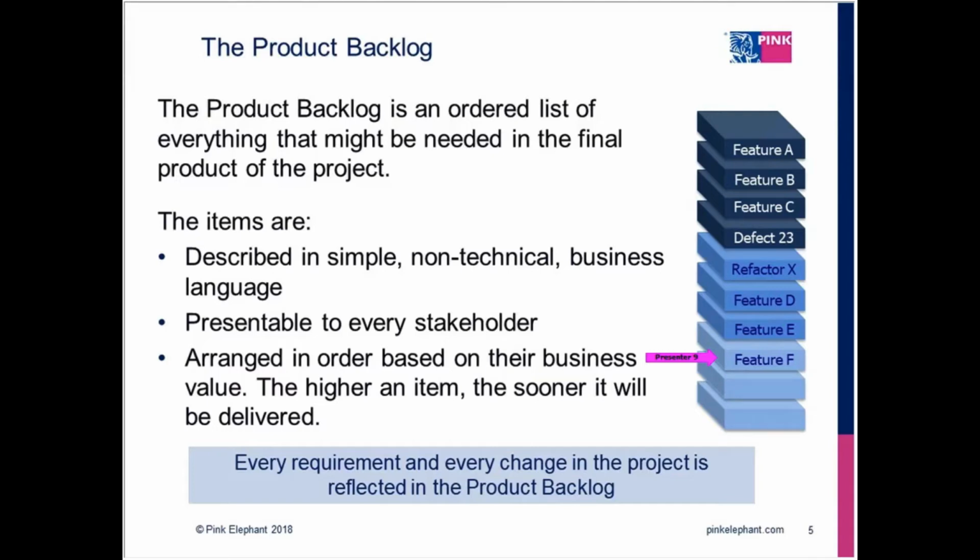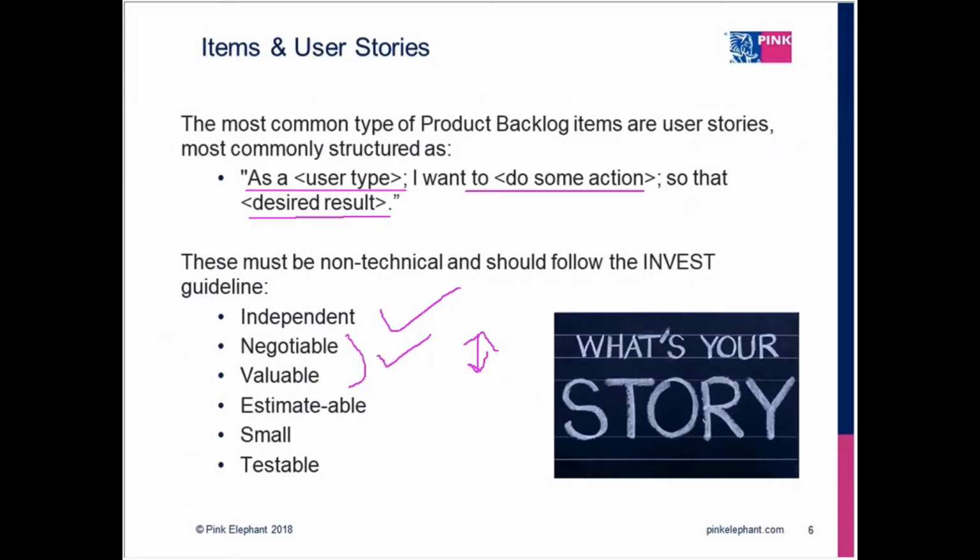And because the story is high level, these user stories are very simple, right? It's a rough estimate. But if you use the same technique for all of these different stories, you find that it actually works out fairly accurate in the long run. And so for each of these stories, we do a rough estimate, and as they approach the top, we'll get more refined in our estimates. Because they're independent and negotiable, they're also estimatable.